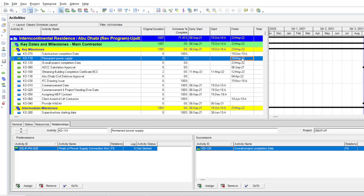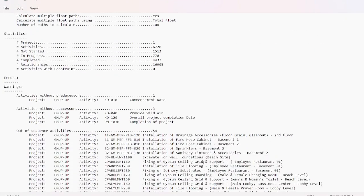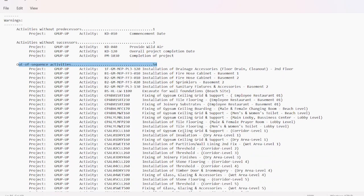Before removing the out-of-sequence activities the completion date was 6th May. After running the program again it shows 23rd May — so removing all out-of-sequence activities actually saved three days. Check the log again by pressing F9 and View Log. You can see that before we had 697 out-of-sequence activities and now we have only 54 remaining. These 54 activities are the ones where the successor is completed and the predecessor is not started — they need to be handled manually one by one.